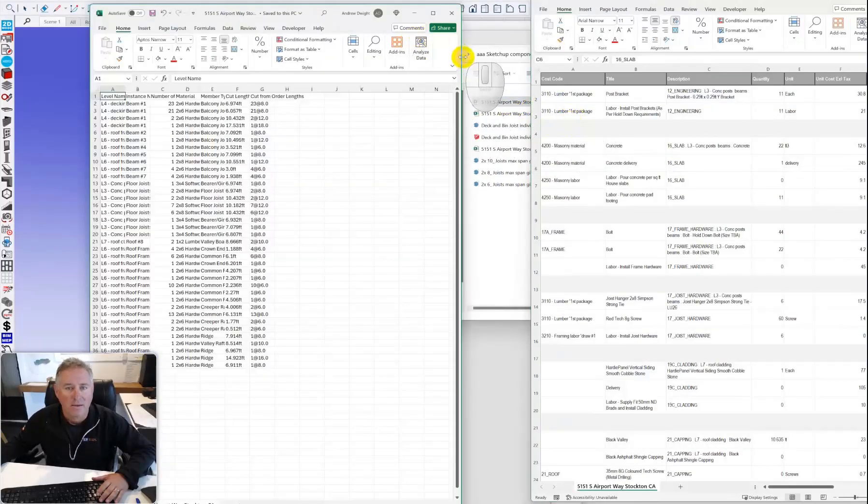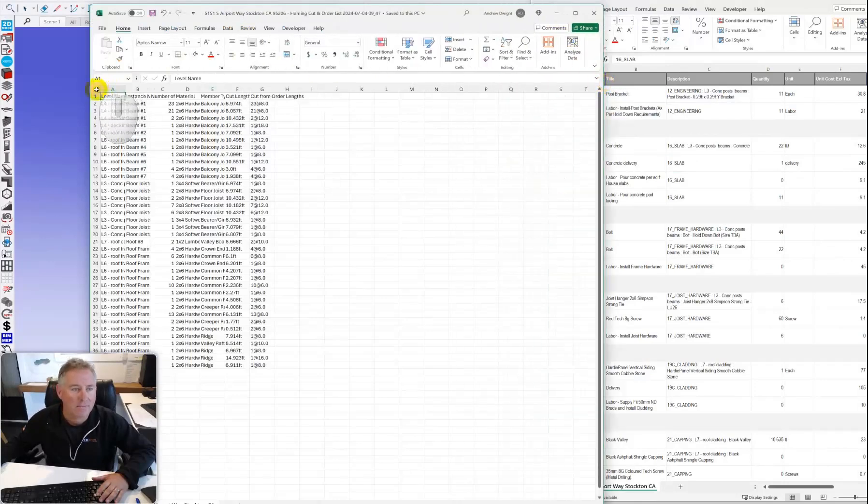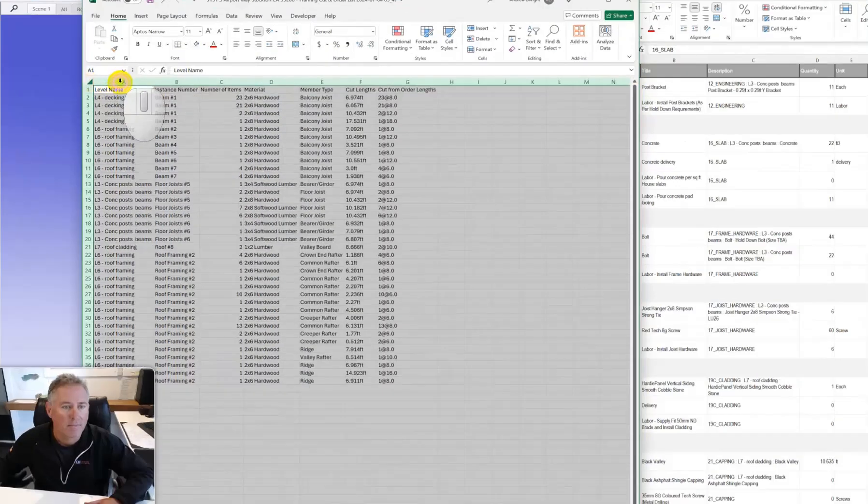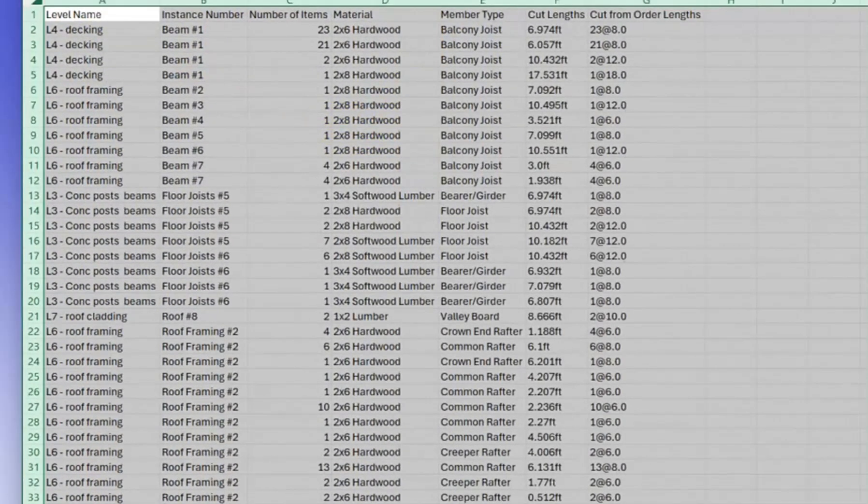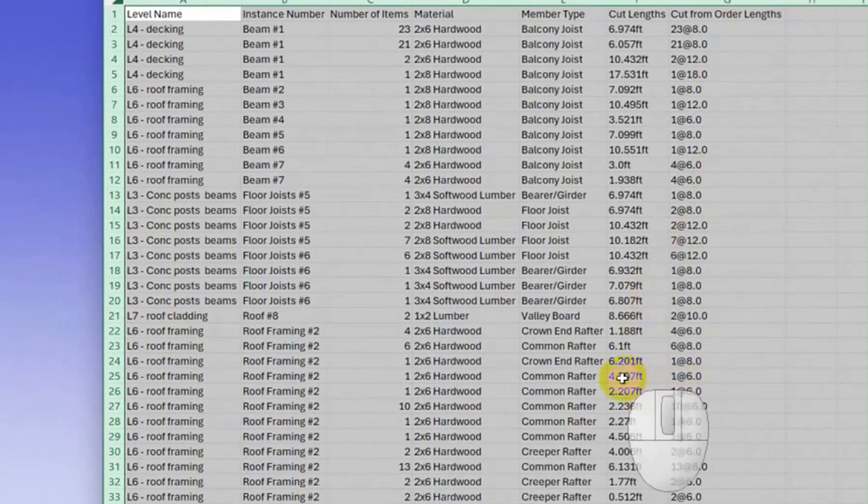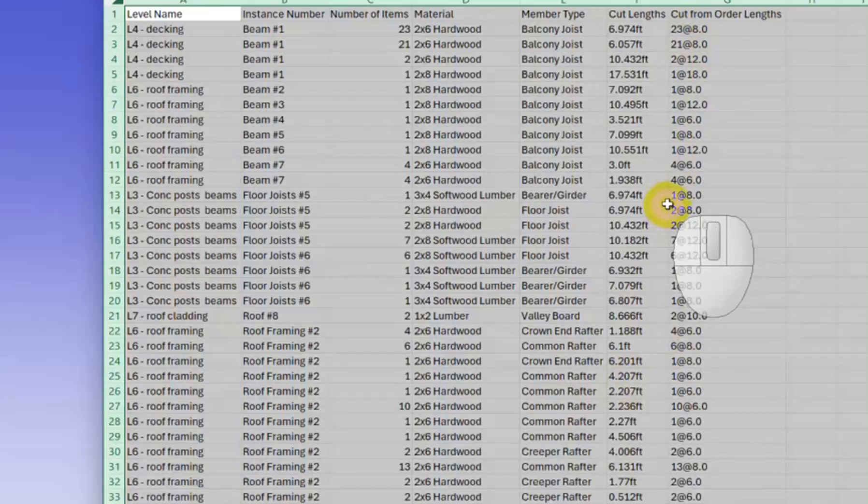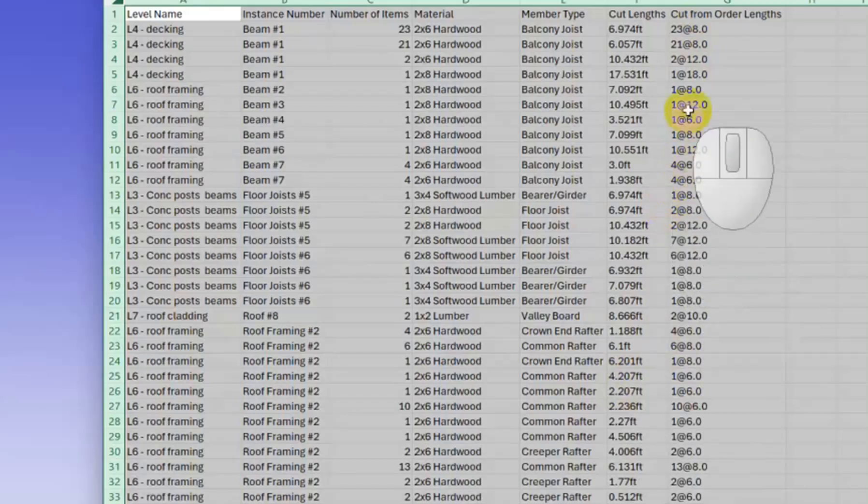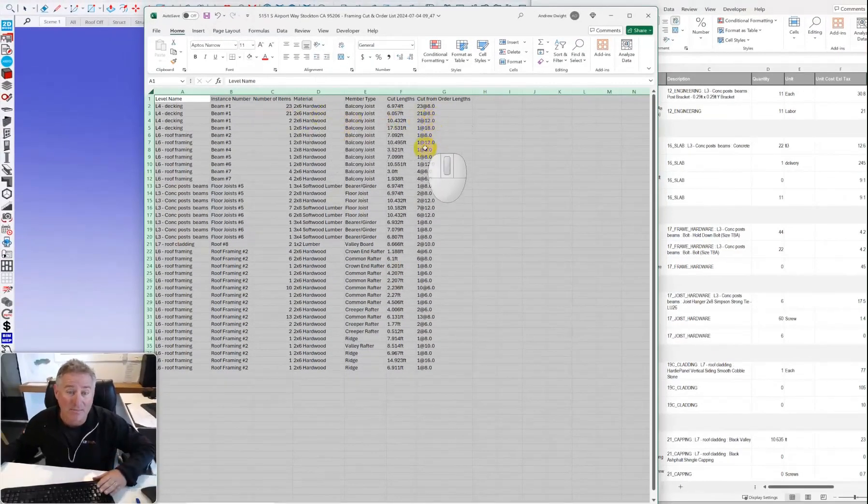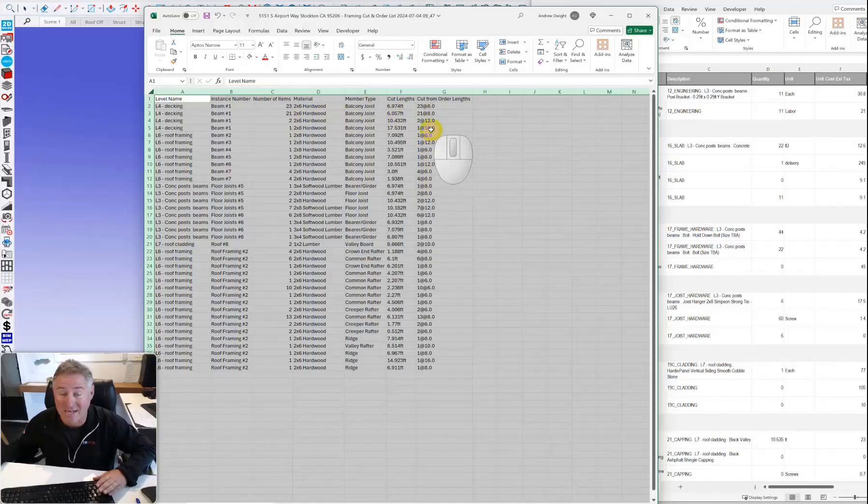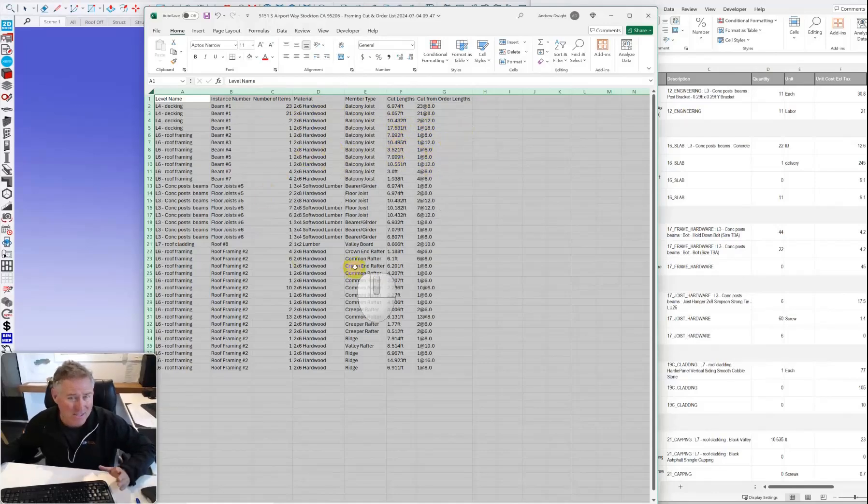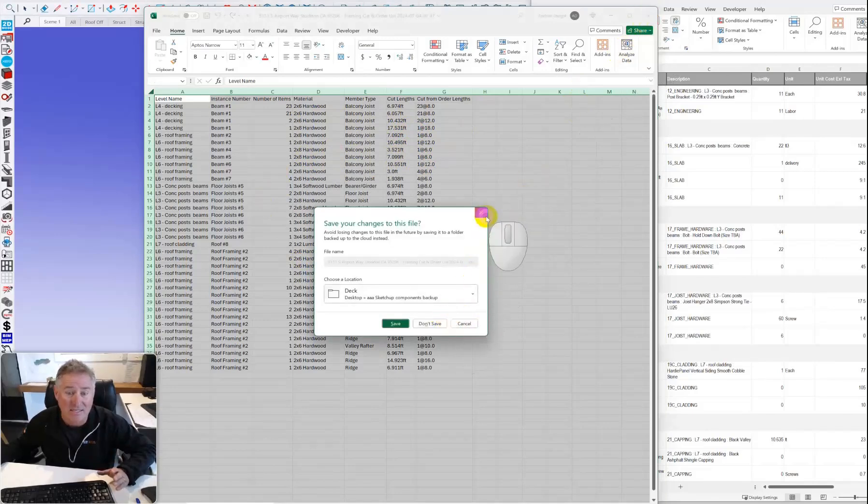It's telling me whether it's a joist or rafter, a common rafter and the size it's been ordered from and the size it will be cut to. We can change our order lengths according to what's available at a local lumber supplier, or if you are a lumber supplier you'll put in the available lengths in the takeoff tool and it can break them down. There's nothing worse than having all of our 18-footers cut up into 9-footers when they were required to be 17 foot. This saves a lot and can be sent to the subcontractor very quickly.